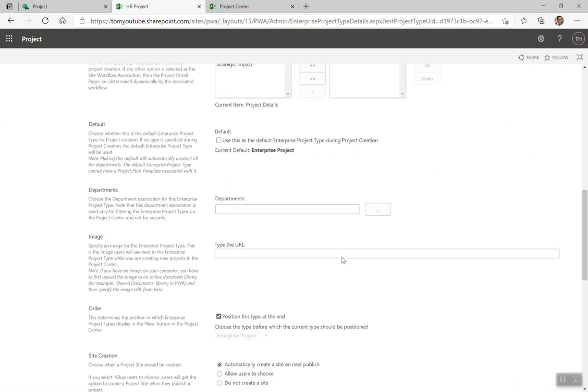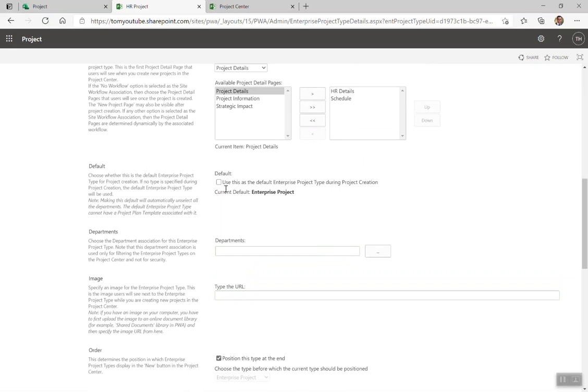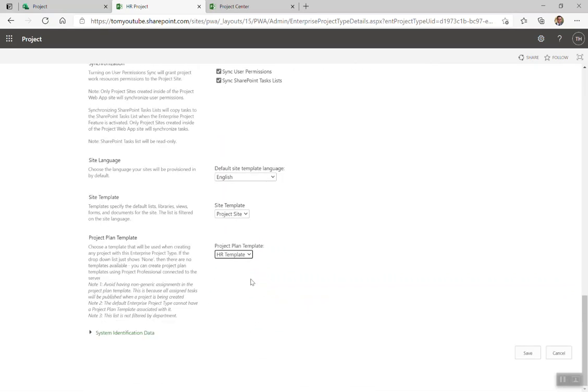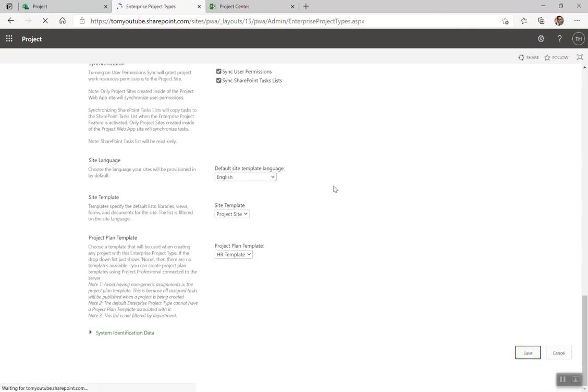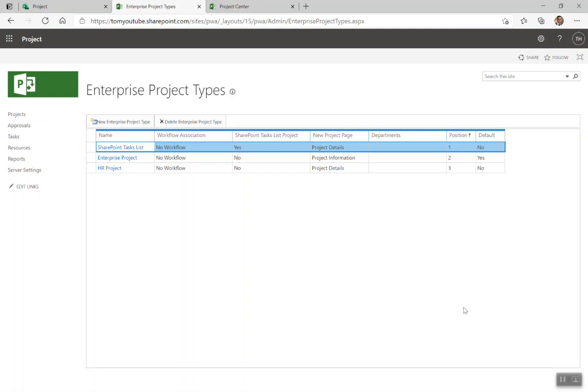As long as it's not the default, I'll be able to select my HR template. Remember I told you in a previous video that if you're using this project type as the default, you will not be able to select a project plan template. I call them project schedule templates. There you go. Plan. Schedule. Same difference. You can call them schedule sometimes as you've probably discovered. All right. That is creating a project schedule template for Project Online. Thanks.